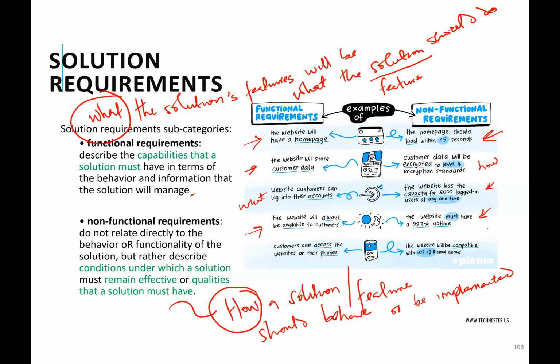Now, these two requirements usually go hand in hand. They go together. If you are using an agile approach, so if your organization is agile, or even the hybrid approach, which mixes agile and waterfall, right? And you are using user stories and acceptance criteria, many times your user story will contain the functional requirement, and you find that your acceptance criteria talks about the non-functional requirement.